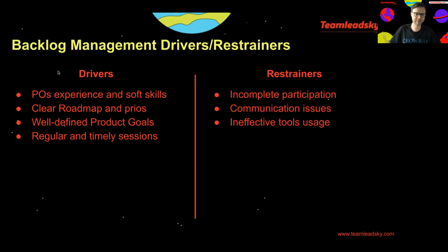So usually when I start working in a team that has some kind of sophisticated Jira workflow, I start with destroying, removing this workflow altogether, and replacing it with a workflow that allows transitions from all states to all states for all types of tickets, and then just defining the column names for the Jira board.